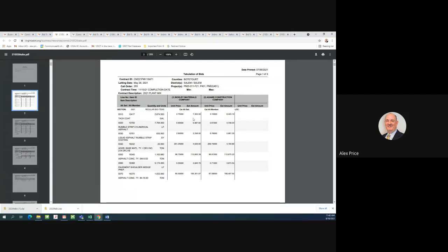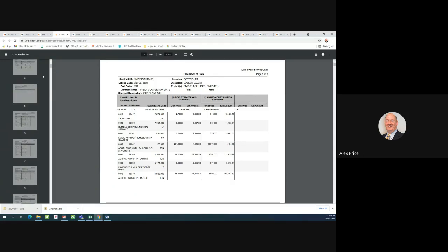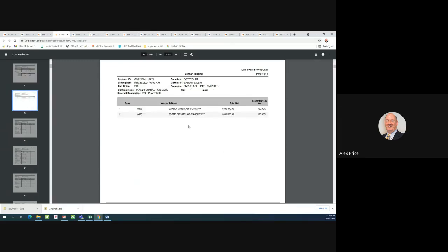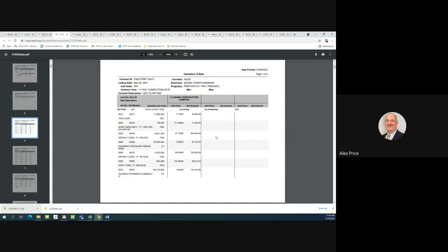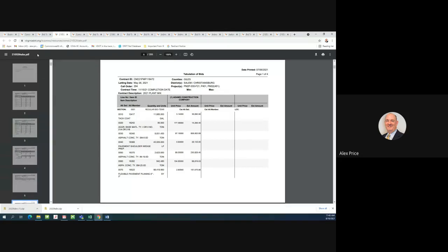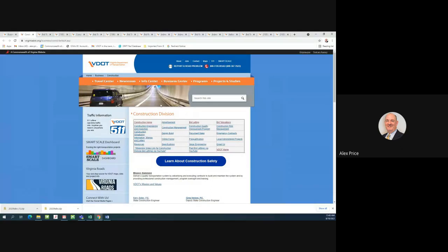And in some cases, there's more than 3 contractors that bid on a job, and you'll see at the end of, say, if this had 5 contractors bidding on the job, this next sheet would be the second and third contractor that bid on the job. So again, you need to know a little bit more information about what you're looking for, but this is where you would find that. And again, we can help locate bid tabs for jobs that are representative of what you're wanting to estimate.